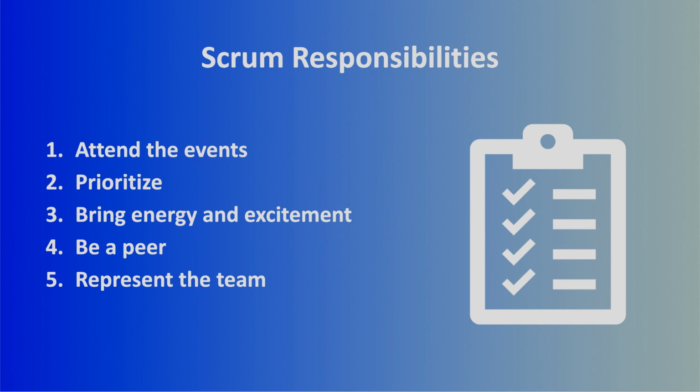Next up is prioritizing work, right? You are the product owner. You are supposed to be making decisions about the product. So you need to be able to prioritize when things come up. If something breaks and your team looks at it and says, hey, this really isn't a break, this is just somebody saying it's a break, but maybe it's a design flaw, what do you think? You as a product owner need to be able to play interference for the team there. You should be able to go talk to that person and say, hey, look, this is a minor issue compared to this great chunk of value we're about to implement. So we're going to stay focused on that and deal with your thing after. So that's a big part of your job, prioritizing work, the backlog, and then things that come up.